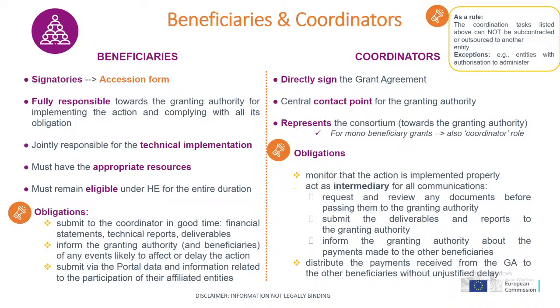In terms of general obligations, you must submit to the coordinator in good time the financial statements, the technical reports, and the deliverables. You must inform the granting authority of any events likely to affect or delay the action implementation. And you must submit via the portal any data and information related to your participation in the action or the participation of your affiliated entities, if you have any.